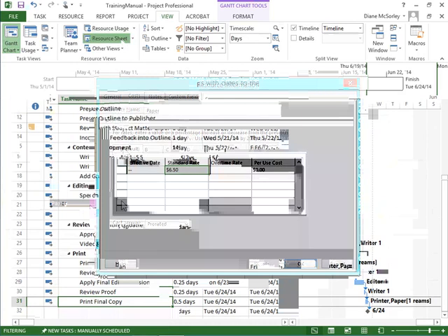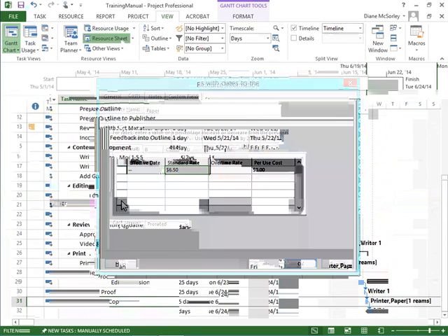but we don't put it in on the A tab, because the A tab, we use that on the resource when it was an increase on a specific date. So if they told us, hey, January 1st, the rate of the paper is going up from $6.50 to $7, we would put it here on tab A, and then starting January 1st, paper would be calculated at the new rate. That's not what's happening here. Here we're going to a different vendor for maybe this one instance, and then all the other paper we'll buy from vendor A. We go to the B tab. On the B tab, I can put in the rate of $7.50.